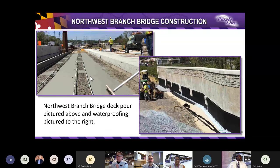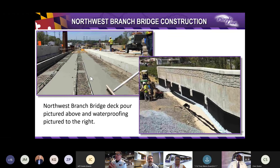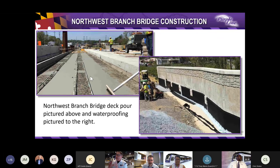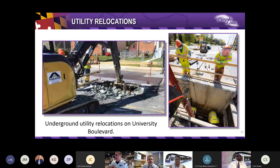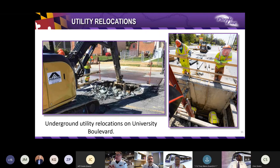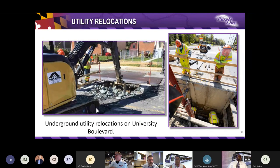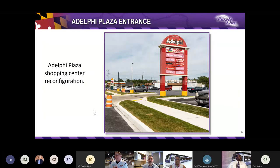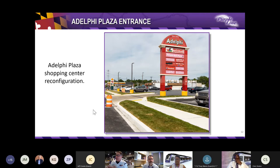Here are some progress photos to show the work that we've done. On the left, we have a deck pour on the Northwest Branch Bridge, and I want to bring to your attention the appearance of the broom. You've heard the term broom-finished concrete. Well, that's achieved using a broom, and I think concrete work is an amazing skill and craft to see it well done, and waterproofing is being shown on the right of the picture here. Here we see in this photo, underground utility relocations on University Boulevard. We have electrical, water, sewer, gas utility relocations that are being done. And here we have the Adelphi Plaza reconstructed entrance to the shopping center here. Looks absolutely amazing.